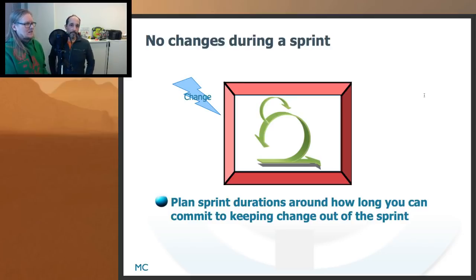Okay, the last slide of this lecture. Maybe we have already talked about this, that the sprint, the iteration, is time boxed. One idea of time boxing is that we don't allow any changes to the requirements, to the backlog, during that time period. So we have the middle point when we change from one iteration to another, and then we can make modifications, even big ones. But during the sprint, we concentrate on the development work.